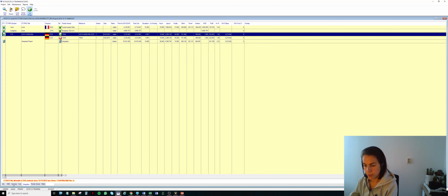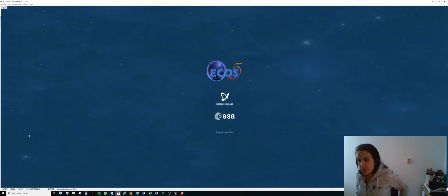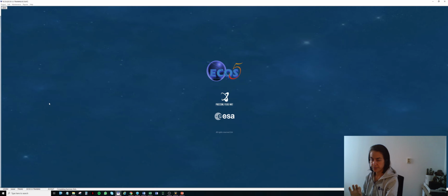So in order to check that this integration was successful, we can go back to the summary tab and once again have a look at our color background. Because remember, it was orange because we had an overlap between the budgetary subco amounts and the ITTs.